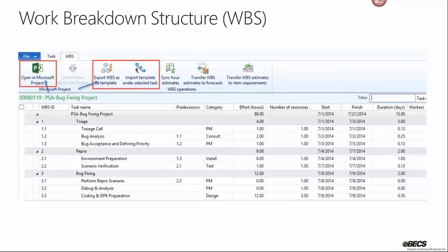So you can go through and see they do different debugging, different analysis, whatever it is. And if you scroll through this work breakdown structure to the right, we can see the hours each task is taking, each expected task, and then the total hours for this entire project. We can see how many resources we have assigned to each step, what people we've assigned, and it schedules it for us, so we can see what the actual time frame is for completing this project.